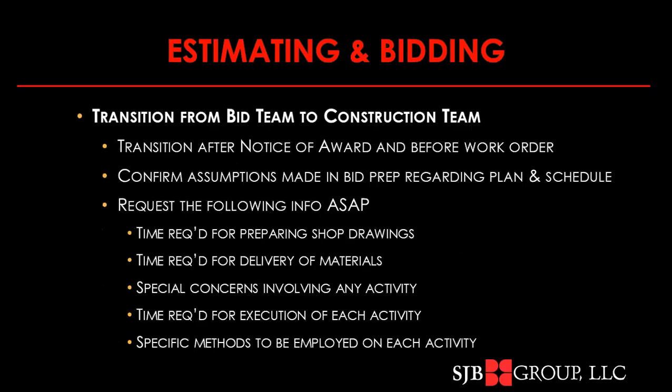Here's some thoughts to help you transition from your estimators to your construction team. Sometimes contractors will wait until just after the notice of award, which basically means, hey guys, the contract's coming, but you need to get that transition done before you get the work order, which is often that notice to proceed, that pre-construction meeting perhaps, basically time to go to work.